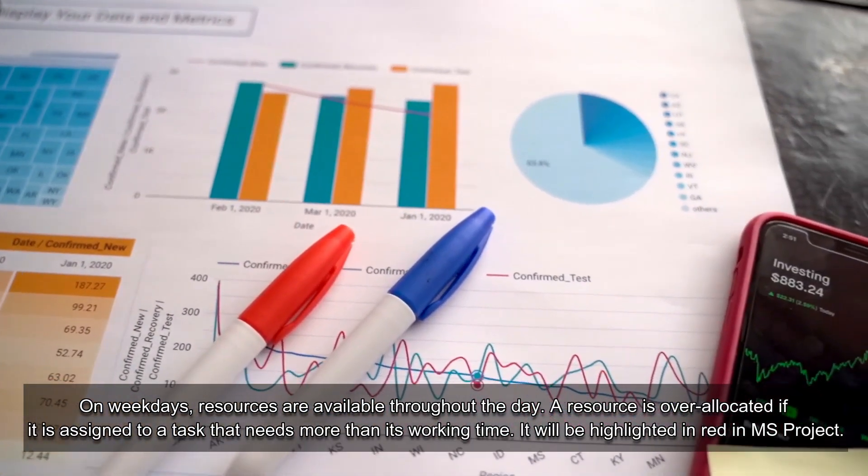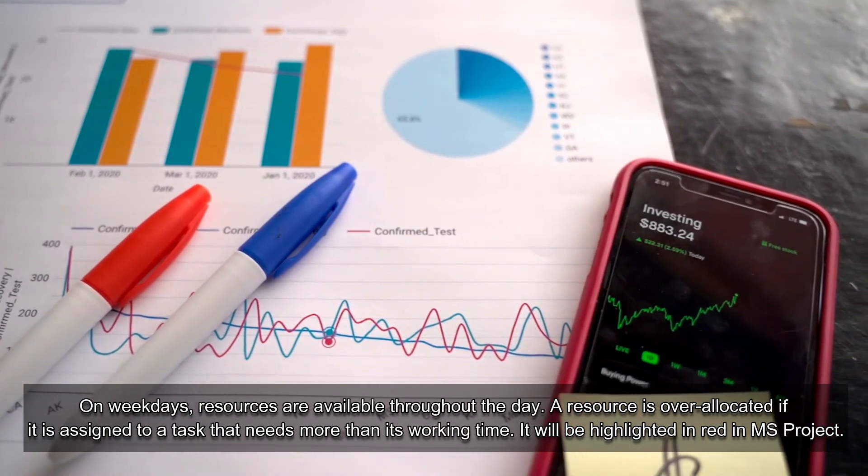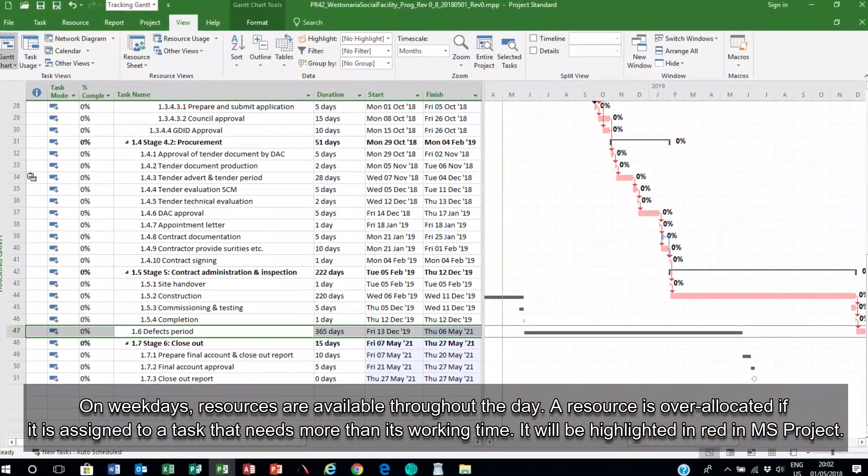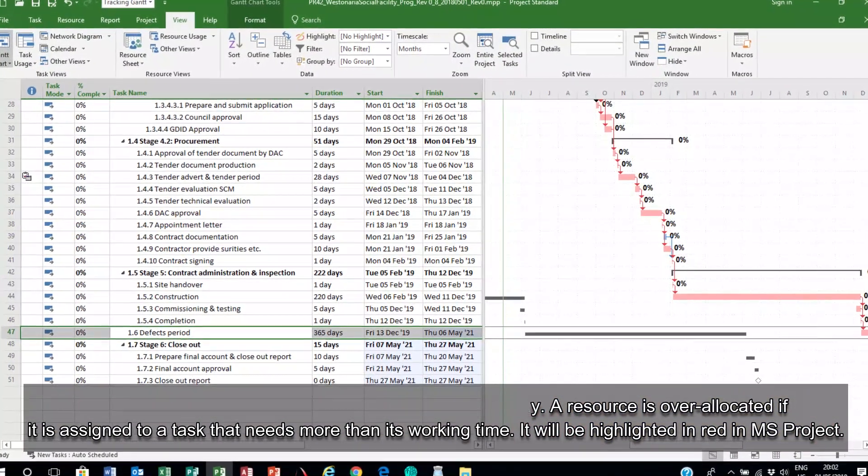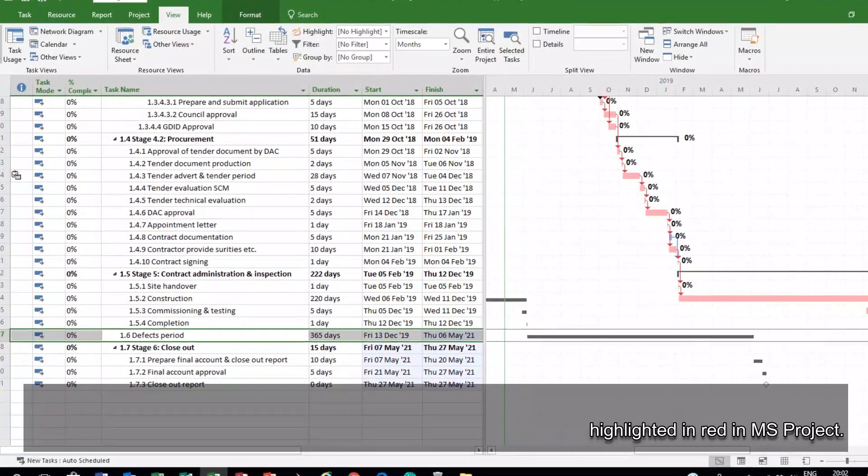A resource is over-allocated if it is assigned to a task that needs more than its working time. It will be highlighted in red in this project.